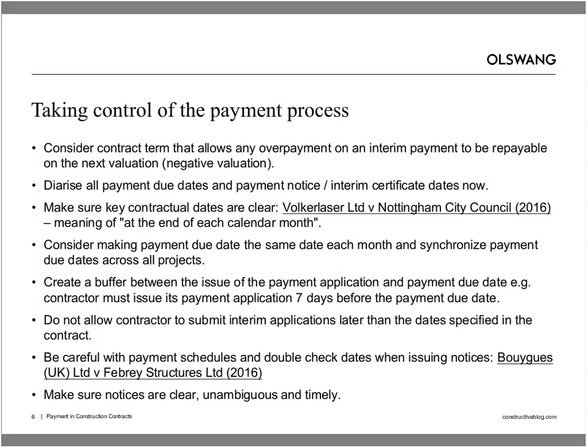Yes, I think the best protection for an employer would probably be a clause that allows the employer to recover any overpayment on an interim payment, so that, in other words, that becomes repayable in the next valuation. Of course, in reality, commercially, trying to negotiate that kind of clause will always be difficult, and we don't see them very often, certainly on substantial building projects.